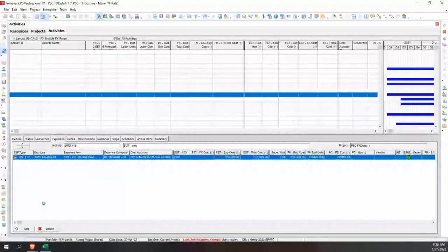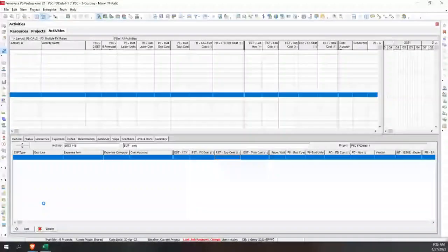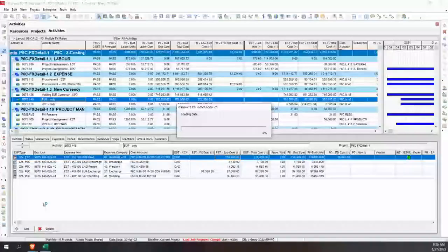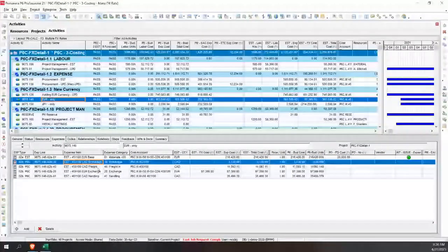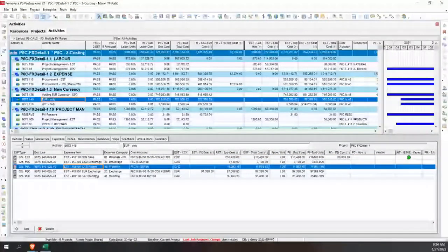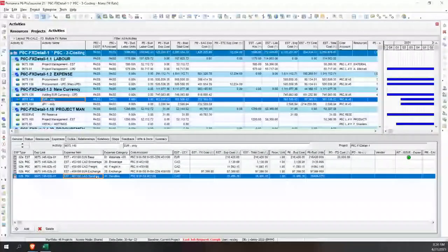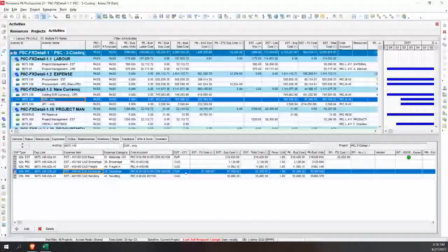So what are some of the items that you know go along with purchasing items? Well, it could be a variety of things in your country, but in this example, we had brokerage fees, we had freight fees, we had handling fees, plus dealing with the multi-currency, we have an exchange rate, okay? So that way we can manage this very, very effectively.